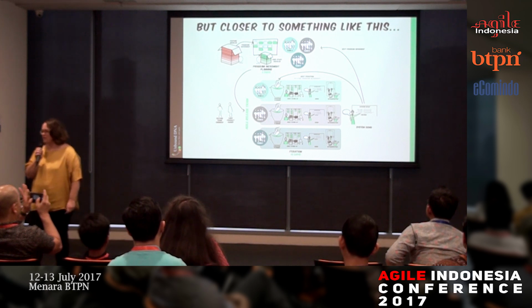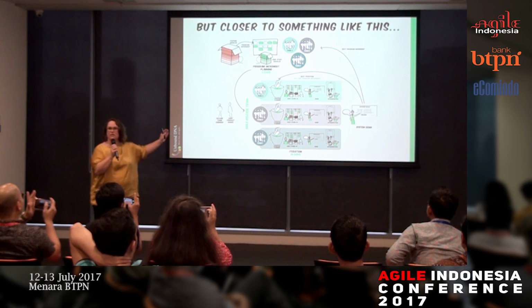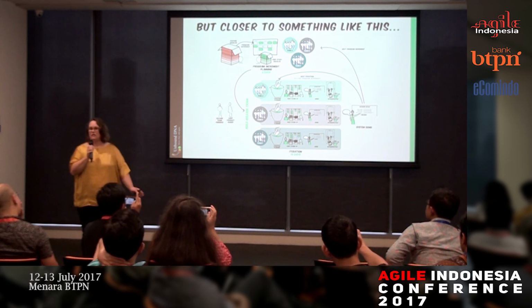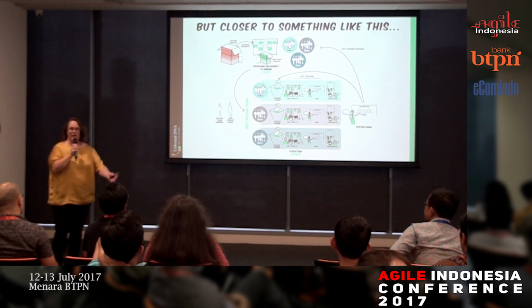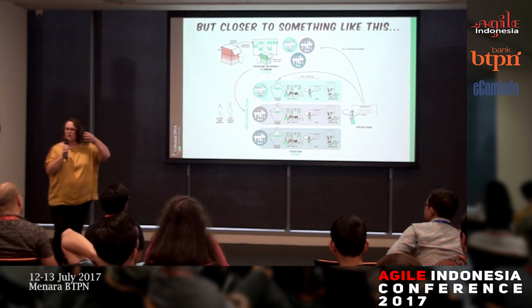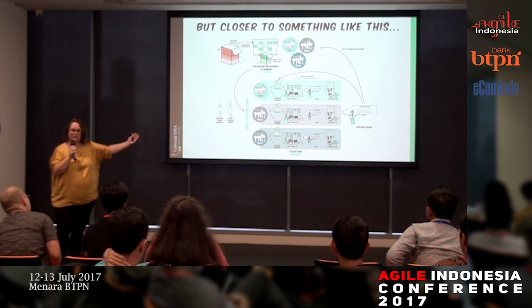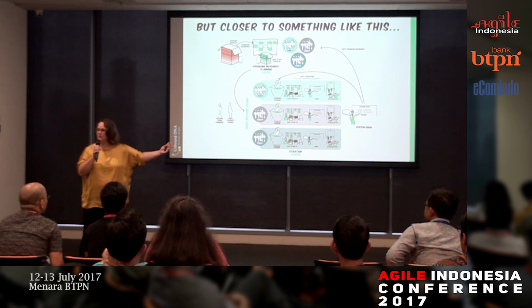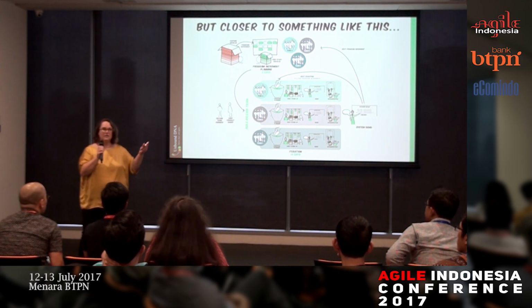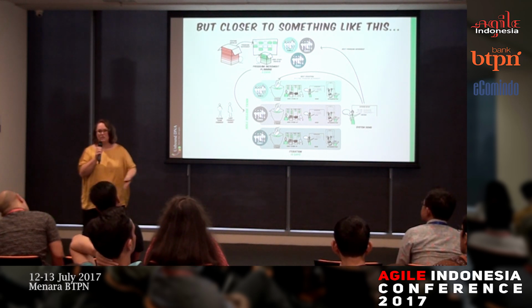I'm going to talk about something more like this, where Scrum is done at scale, where you have multiple teams working in parallel, and then at a larger concept, they're going back up and pulling at a macro level into, in this example, a SAFe representation. That's not the SAFe picture that everyone else puts up, it's my drawing of it. But it's a very simple perspective of SAFe, where you're regularly going back to something like PI planning every 6 sprints or 6 iterations, and then you're going through those constant loops.